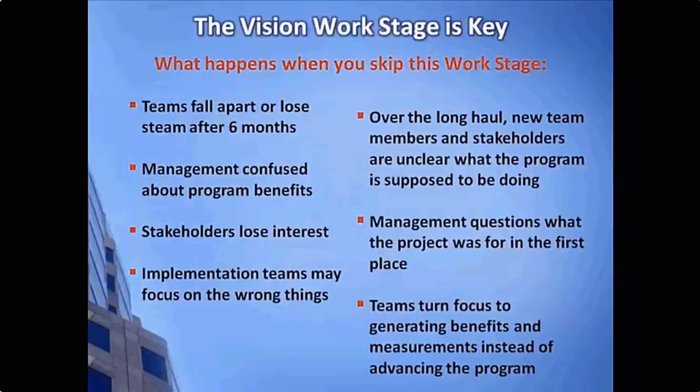The importance of the visioning work stage really can't be stressed enough. As we said earlier, without this, your implementation teams will tend to fall apart or stall somewhere down the road. Management may constantly question, why did you start this project in the first place? What are we getting for our money? Resistance levels to the effort may become high, and the implementation team is constantly diverted to really non-value tasks to justify their efforts over and over.